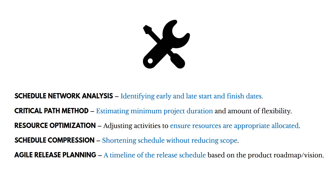Schedule compression shortens the schedule without reducing scope. If the schedule is taking longer than anticipated, you might add budget to bring in additional resources to compress it. For agile projects, you can use agile release planning — developing a timeline based on the product roadmap and vision, deciding whether you'll have sprints every two or four weeks.